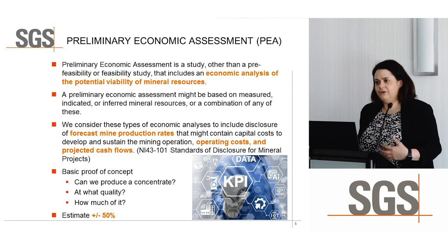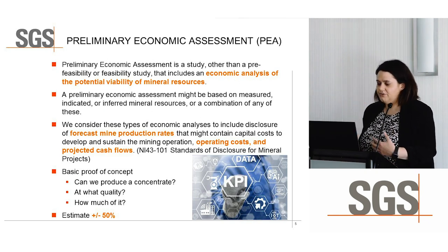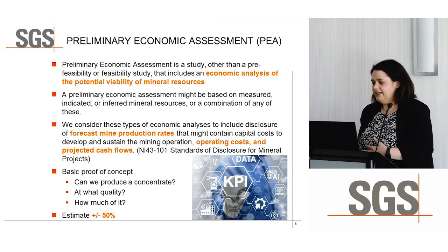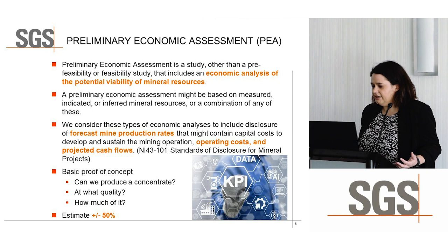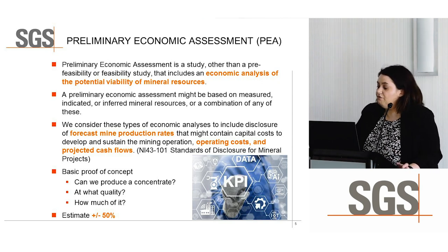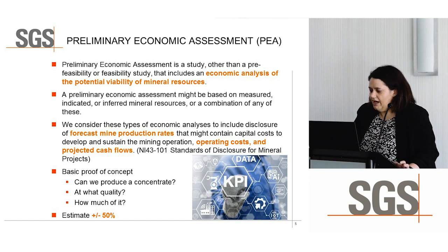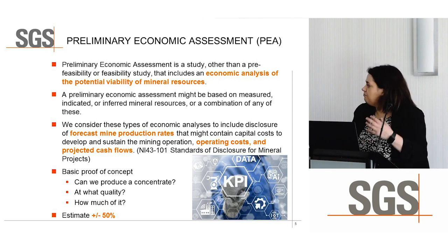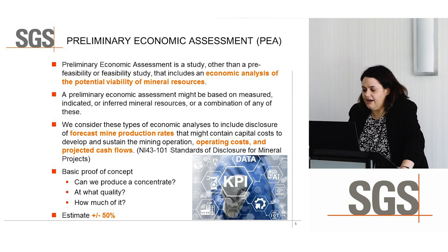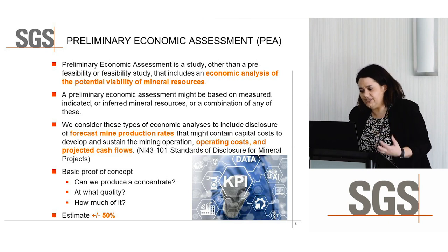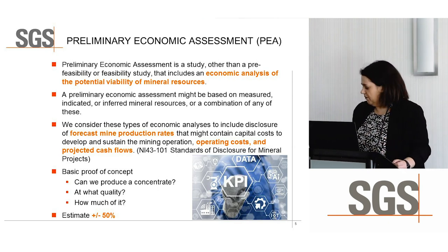So generally, when you're doing a resource evaluation or you've got a project, you'll start off doing some exploration. You'll then get to the PEA stage, which is basically the economic analysis of a potential viability of a mineral resource. The assessment is based on if it's measured, indicated, or inferred, or any combination of these. At this point, we look at things in terms of capital costs, operating costs, and things like that. But basically, it's a basic proof of concept. So can we produce a concentrate? What is the quality of it and how much of it? So it's a very high level understanding from a metallurgical perspective of the ore deposit.